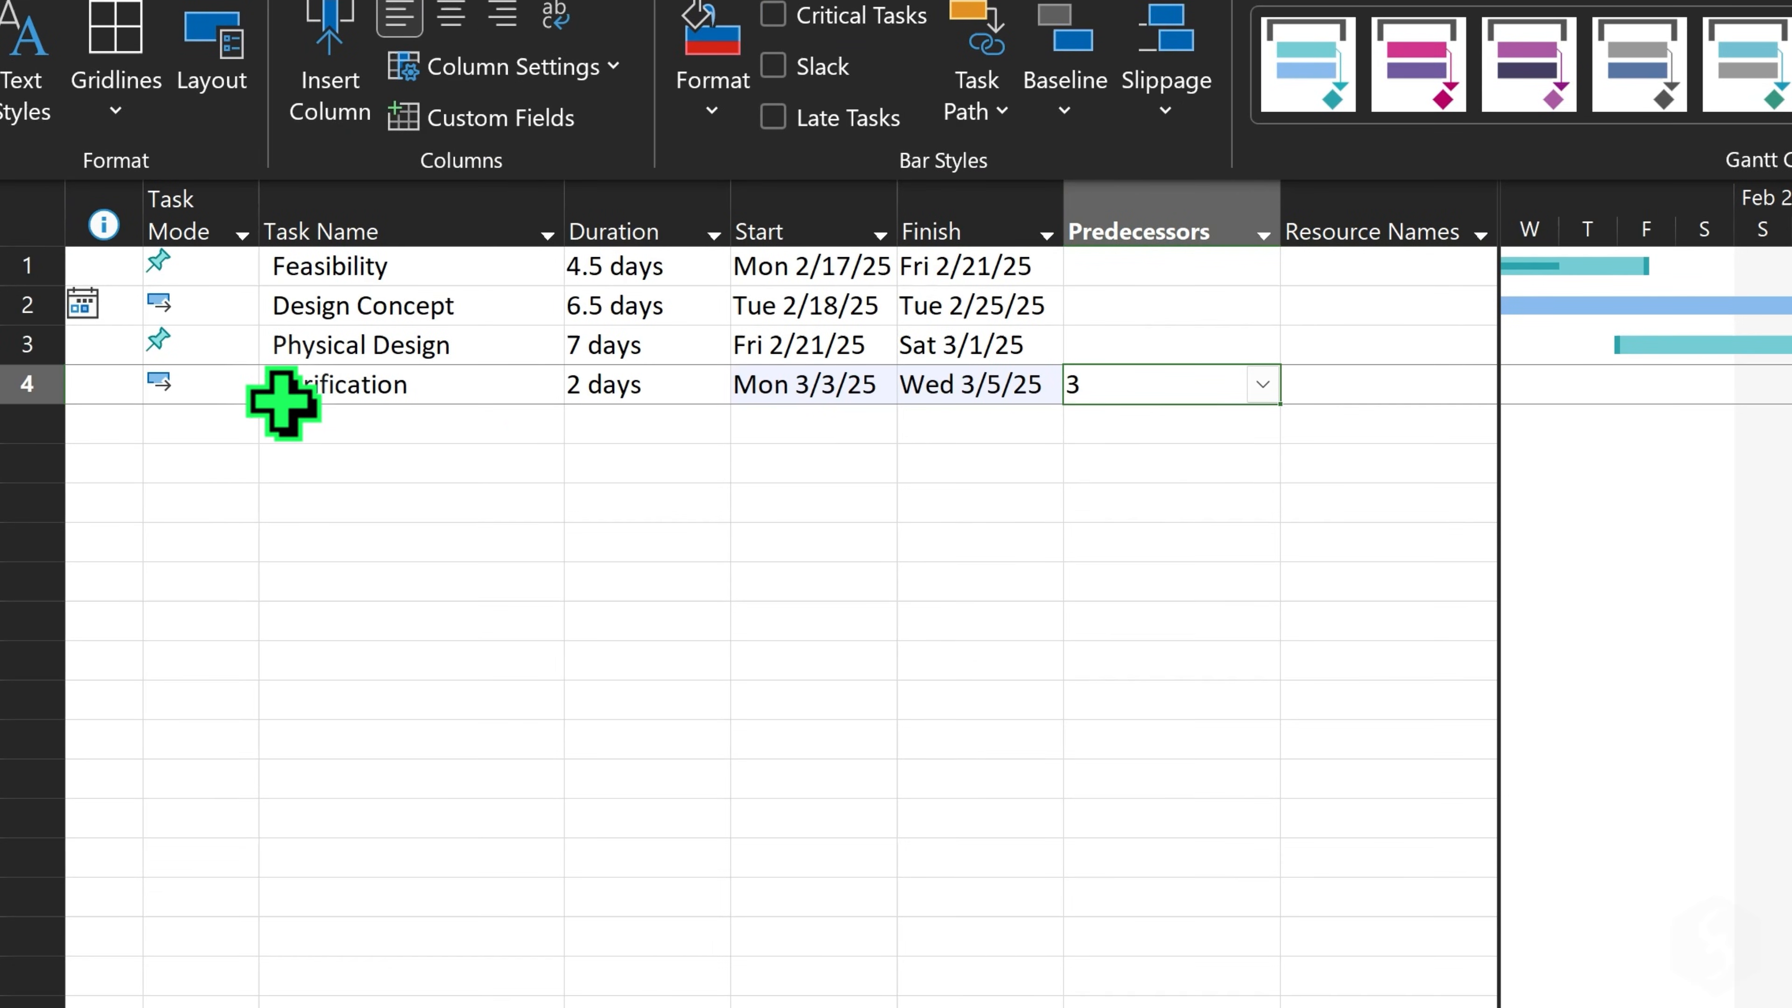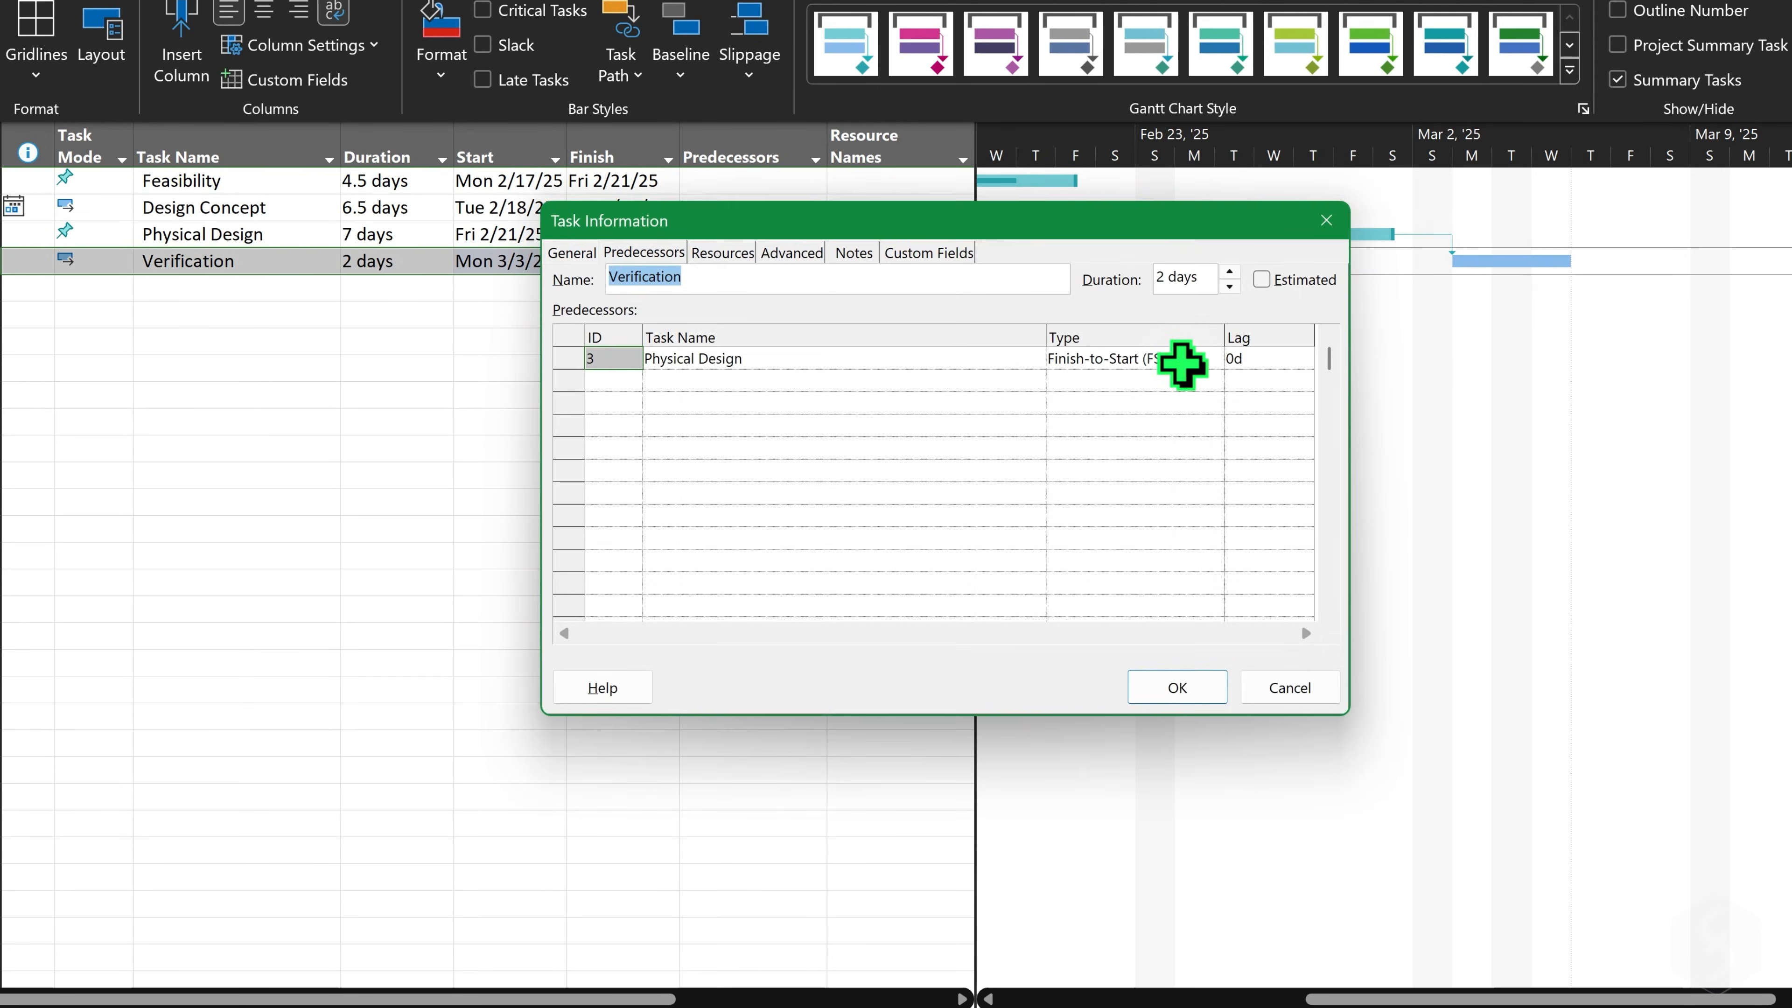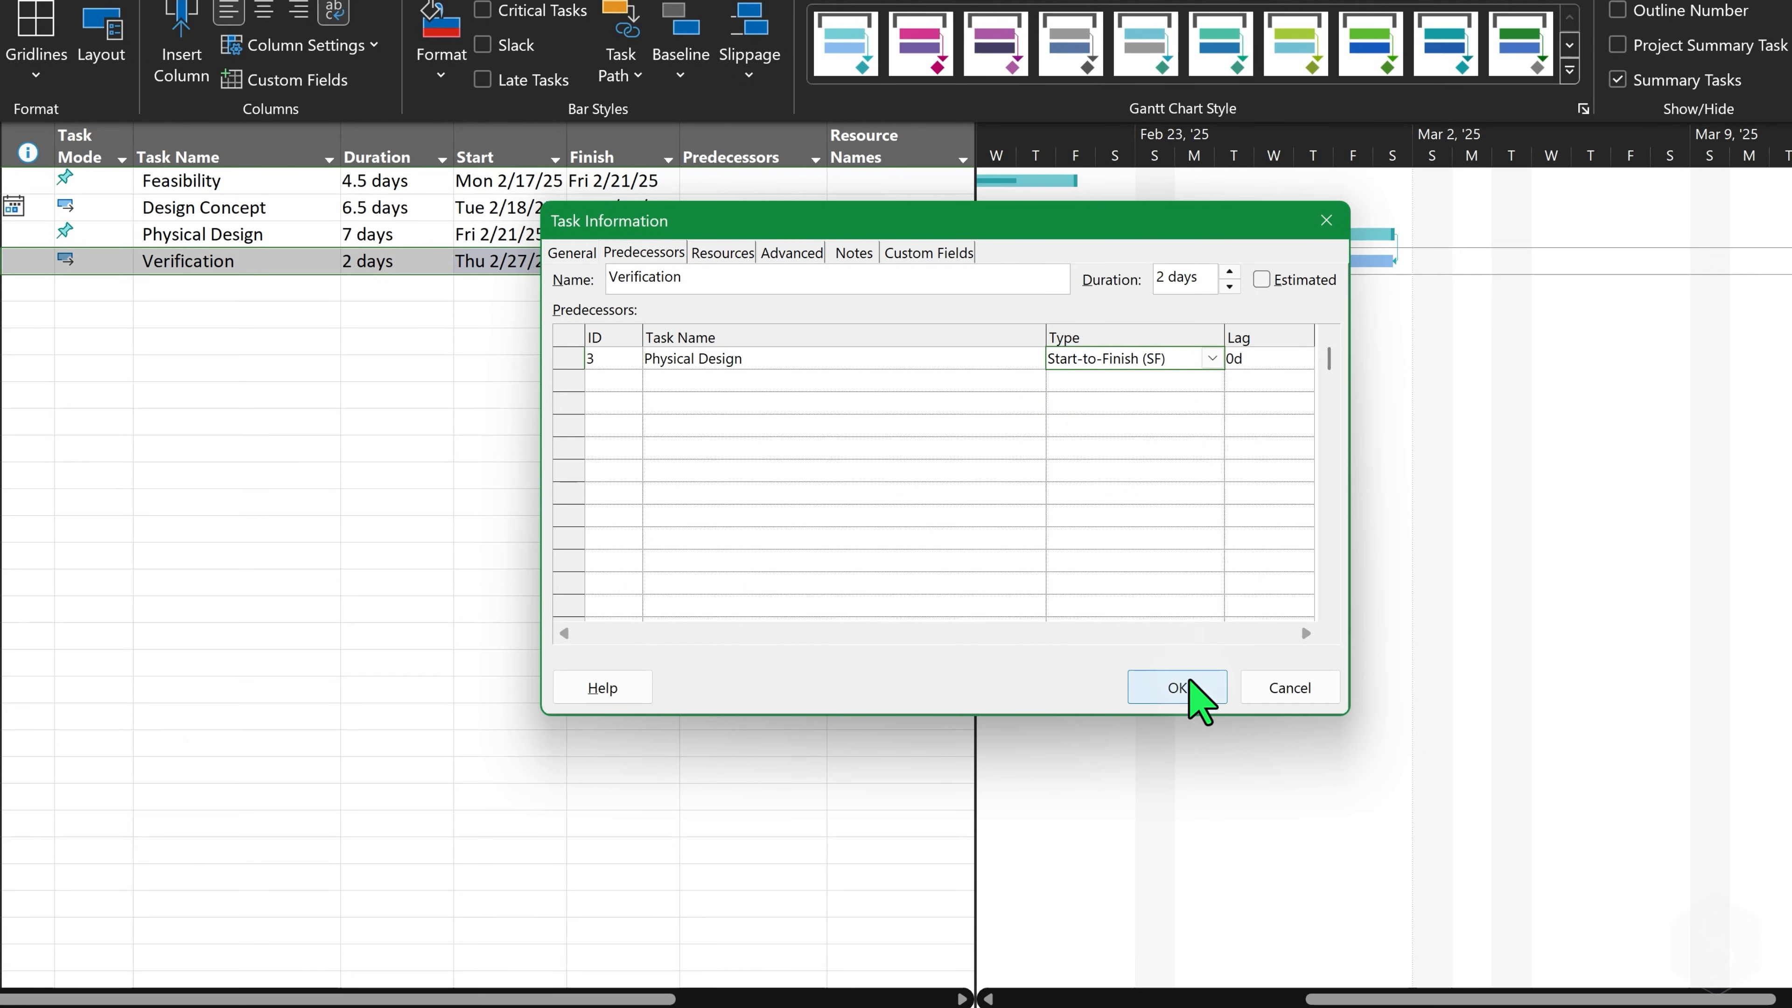The second task also gets the first task's row number under the Predecessor column on the left. To manage links, open the Task Information panel and go to Predecessors. You can add any lag using units like Hours, Days or Weeks and change the link type. Select Start to Start to start the current task when the Predecessor starts. Finish to finish to end the current task when the Predecessor finishes or Start to finish to end the current task when the Predecessor starts.